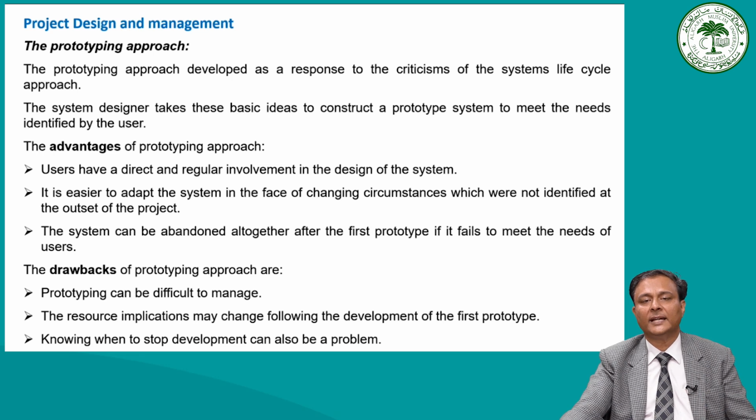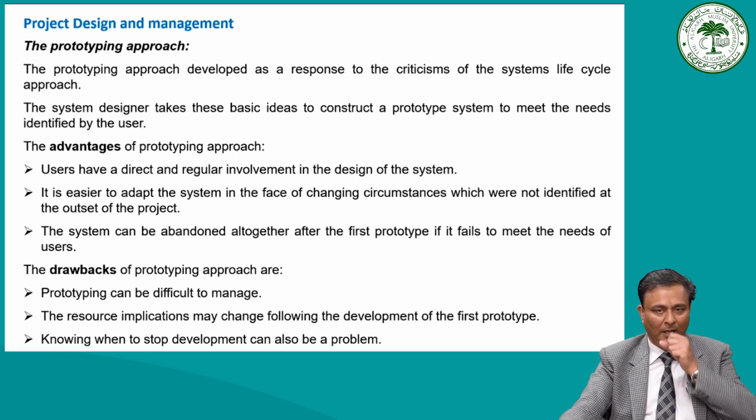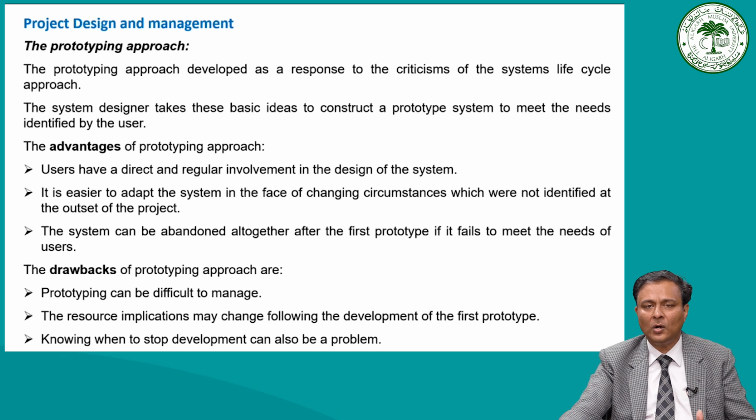The system can be abandoned altogether after the first prototype if it fails to meet the needs of the users. This reduces the cost of developing the full system. So here you would understand that the user's requirement is of paramount importance, and this has been given a lot of emphasis in this prototyping approach.